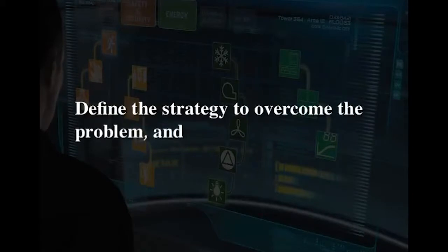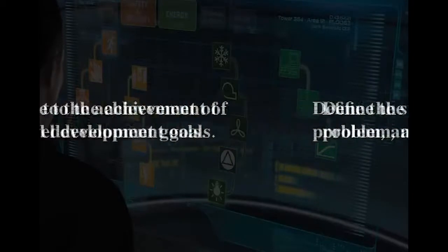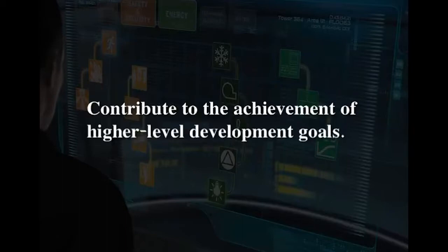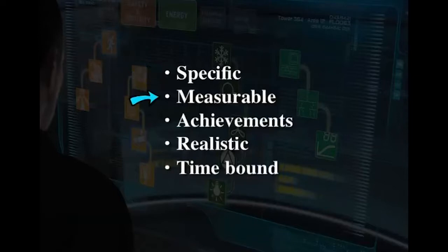Project objectives should correspond to a core problem. They should define the strategy to overcome the problem and contribute to the achievement of higher level development goals. When formulating objectives, keep in mind that objectives should be SMART. This stands for specific, measurable, achievable, realistic, time-bound.